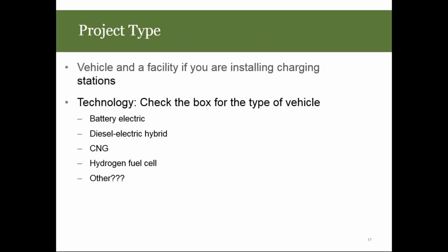And when you're making that project up, you want to look at not just the vehicle, but how are you going to charge it? How are you going to maintain it? What type of charging do you need for the route that you want to turn into electric? You heard the panelists talk about fast charging and then long distance, that we have different buses and different types of charging for different service designs.